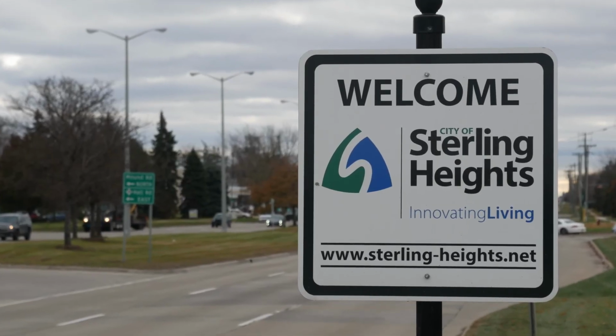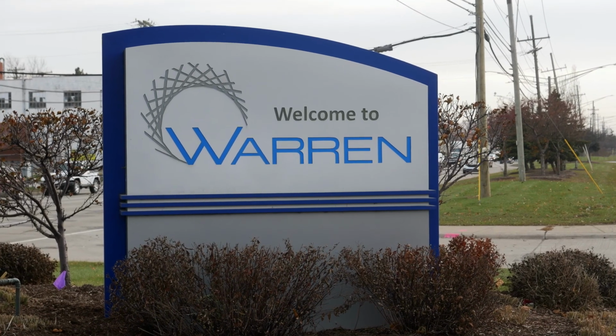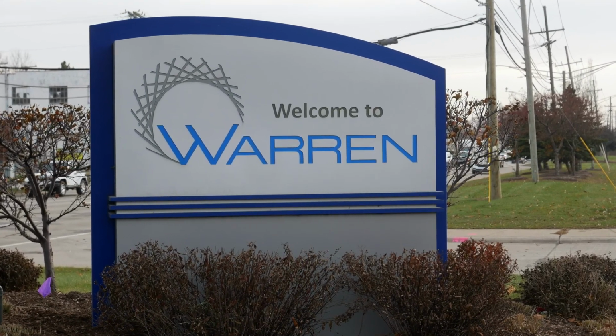To reconstruct the road, it's about $200 million. So we reached out to our partners in the city of Sterling Heights and the city of Warren, and we developed a partnership of funding that additional money. And this was the way that we could rebuild the corridor in about 3 years.